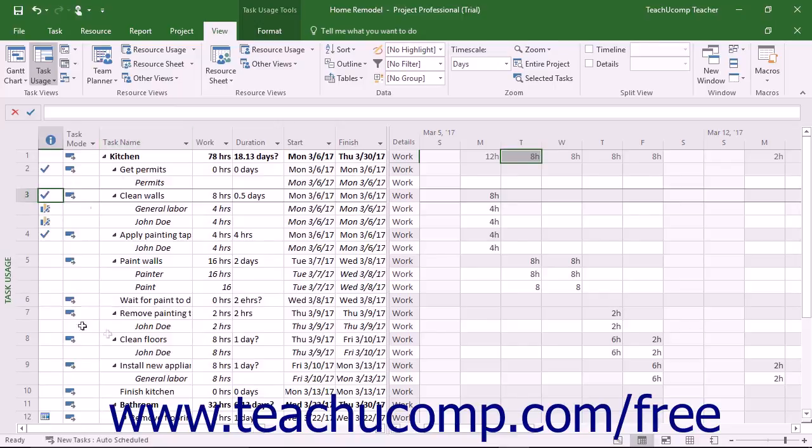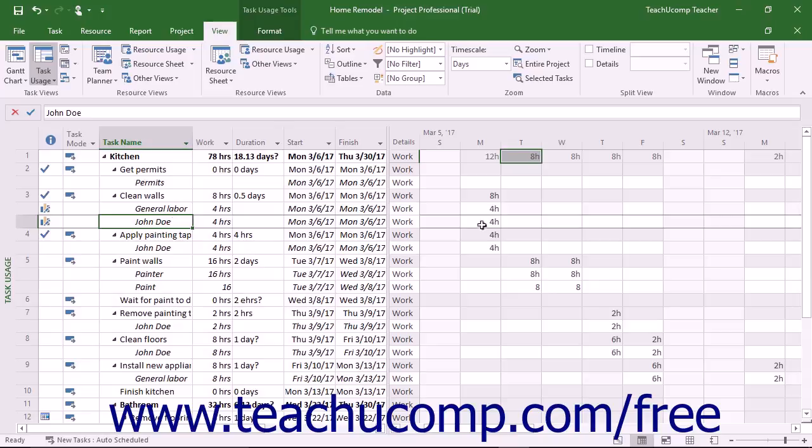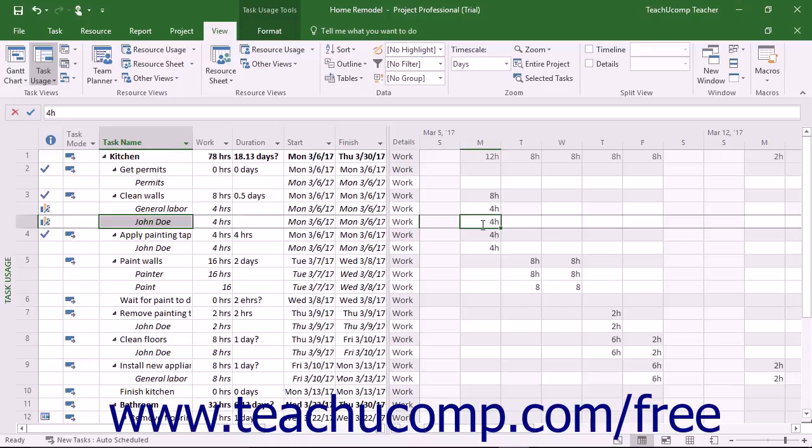At the left side of this view is a table that lists the project tasks and their associated work resources. The right side of the view is a timescale calendar view that shows the amount of work performed by each task resource for the given days. The work appears within selectable cells whose values you can edit if needed to modify the work hours on tasks for the associated resources.